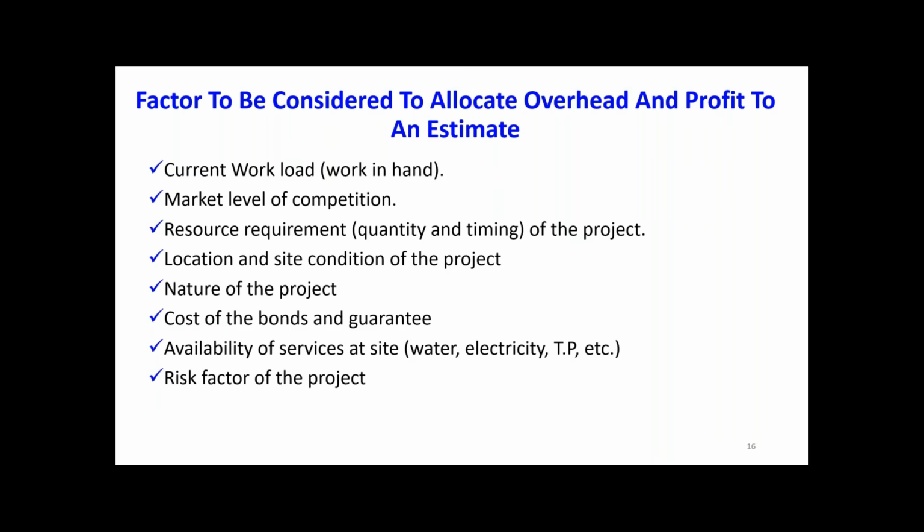If the risk factor increases, our profit and overhead margin is going to increase. Delay damages to be included, you have to see what the LAD is, that is a risk factor. As long as you see the risk, you have to increase your margin. That's what you are doing. There are so many other factors.